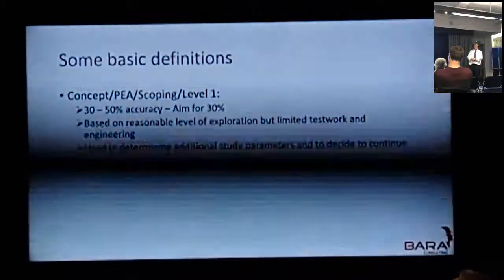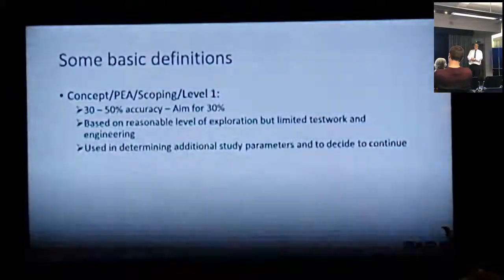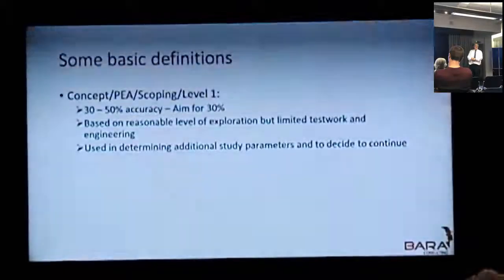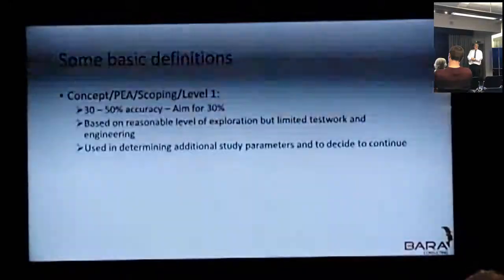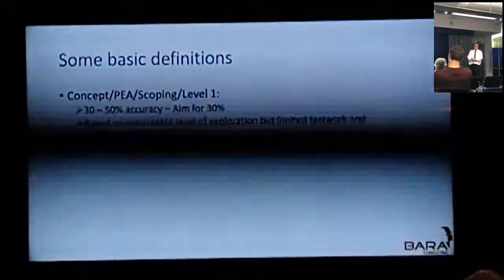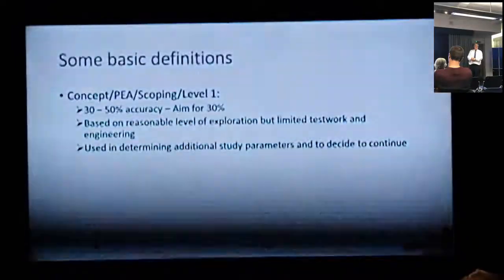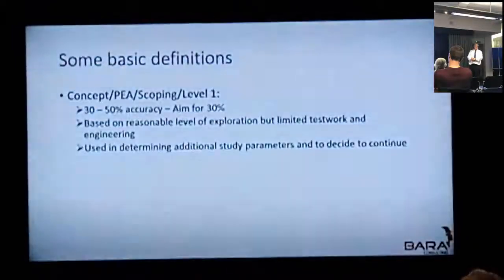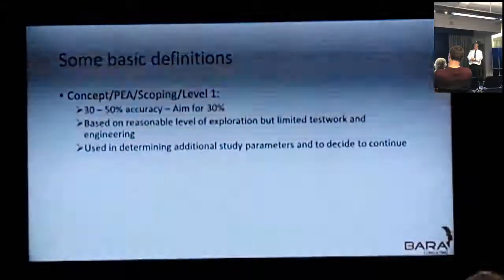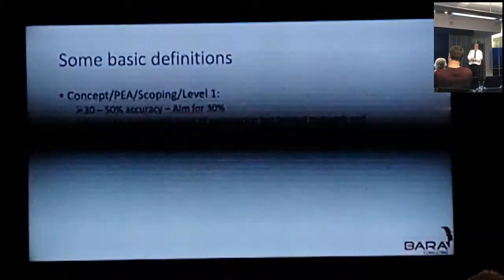Just very quickly going through some basic definitions. A concept study — also called a preliminary economic assessment, scoping study, or Level 1 — is typically within 30 to 50% accuracy. I would suggest the aim should be around 30%. It's based on a reasonable level of exploration and limited test work and engineering. The main reason for doing these studies is to determine additional study parameters and to decide whether to continue or not.